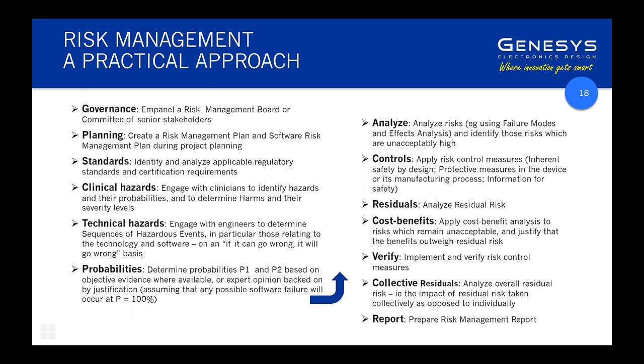Of course, in determining risk mitigation measures, we must verify that the risk control measures have in fact worked and are effective. So if you've got software watchdogs to reduce the risk of software crashes causing loss of function, you've got to make sure that the watchdog actually works.